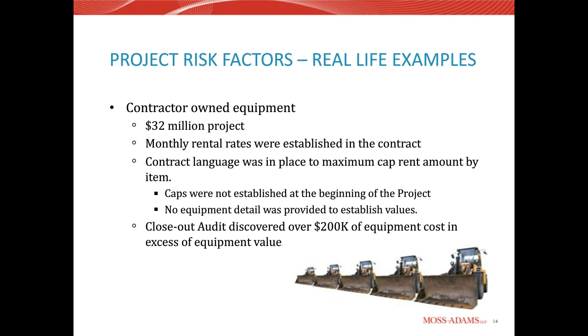A couple big critical things here, and some ways to avoid this, is establishing those caps at the beginning of the project. One important thing about establishing those caps is establishing the value of the piece of equipment when it comes onto the project, and also, with the projected end, establishing what the salvage value is going to be.